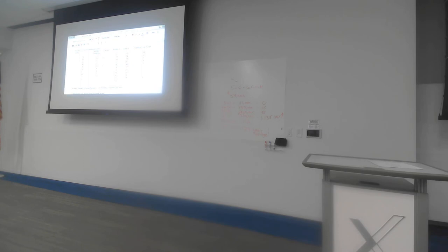But we have to be careful. And here is where the skill in accelerating projects comes in. If I go back to my project network diagram and look at my critical path, activity G isn't on the critical path. So even though it doesn't cost me a whole lot to crash that activity, and I can crash it from 4 days down to 3 days, if I do that, the overall project duration won't come down at all, because the overall project duration is dictated by the duration of the critical path. Because G is not on that critical path, I can crash it all I want, but it's not going to bring the project in any sooner.